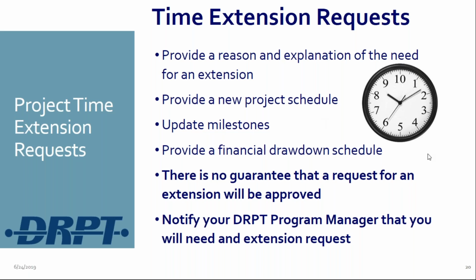So if you were to tell us that you need 3 extra months for a delivery of a bus, but you request a 1-year extension, then we're probably going to modify that for a 3-month, possibly a 6-month extension. So I'll stop there and ask if anyone has any questions on time extension requests.